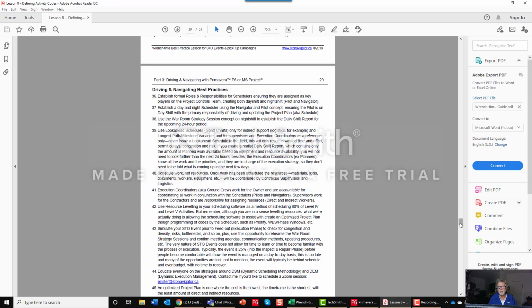So just remember, capital PF is productivity factor applied to a benchmark estimate before we do the work. Small pf is performance. It's an outcome. It's what we measure. So I get good performance, not good productivity. So I apply productivity to benchmark. Planned is my estimated crew times duration to get man hours. That's planned or budgeted. Earned is percent complete. I can never earn more than planned. And actual is dollars. Actual is what did it actually cost me.